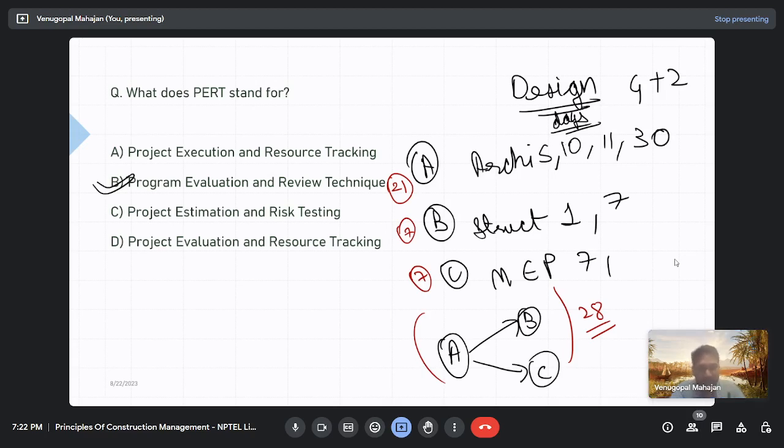As you can see, the number of resources remains the same, all the conditions are the same, yet there are some uncontrollable uncertainties that are changing the duration. You should remember this, because when we talk about crashing, there would be uncertainties, but those would be controllable, and we would be changing the resources themselves to crash the duration.